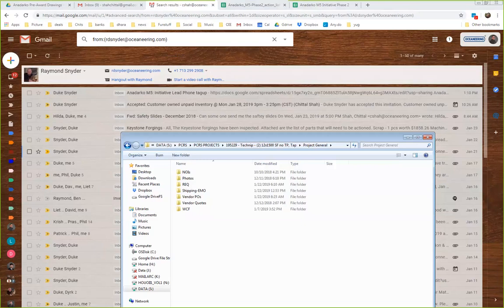Now, when you're dealing with connectors and other things like OCS parts, there are cases where it might not be the forging, it might be the Greylock. Greylock takes a long time for us to get anything. So Greylock becomes the long lead, and we focus on that. So whatever it is, it's normally dissected out and talked about upfront, dates are put to it, and then we track to those. Once those are done, everything else falls in as and when you get released, and we'll work through that.